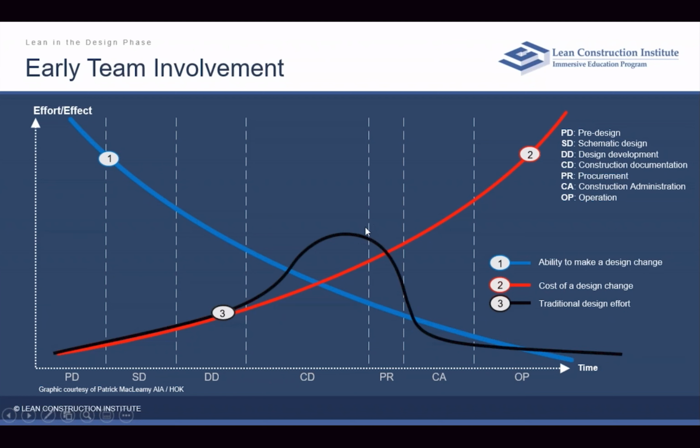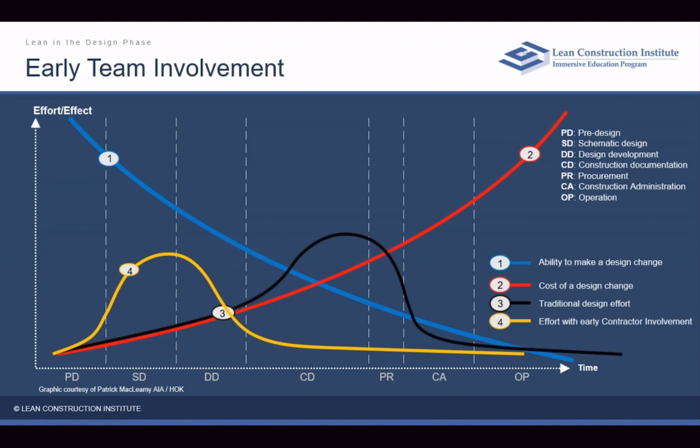Traditional delivery often involves being alone, not meaning without a design team. But what we're aiming to do is pull that effort up front and get it earlier in the whole project. We are shifting this black curve towards the gold one. This means, if all goes well, the costs are incurred earlier in the project, with the goal of incurring less cost overall towards the end.